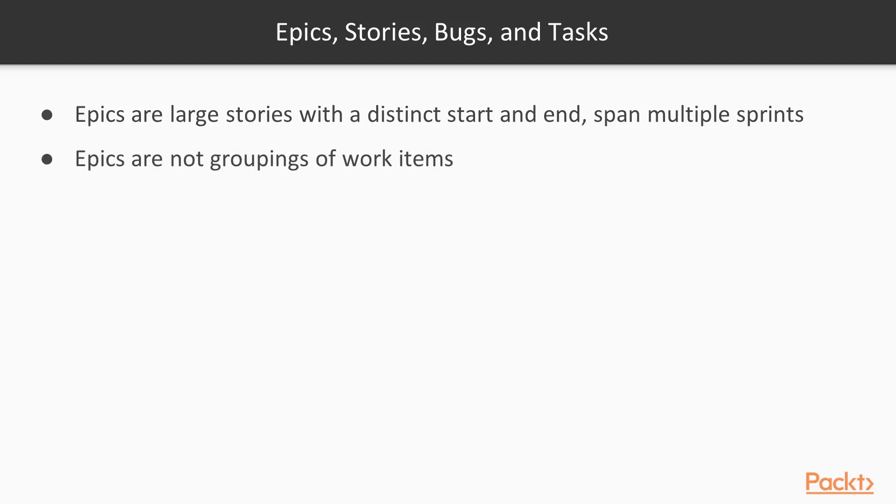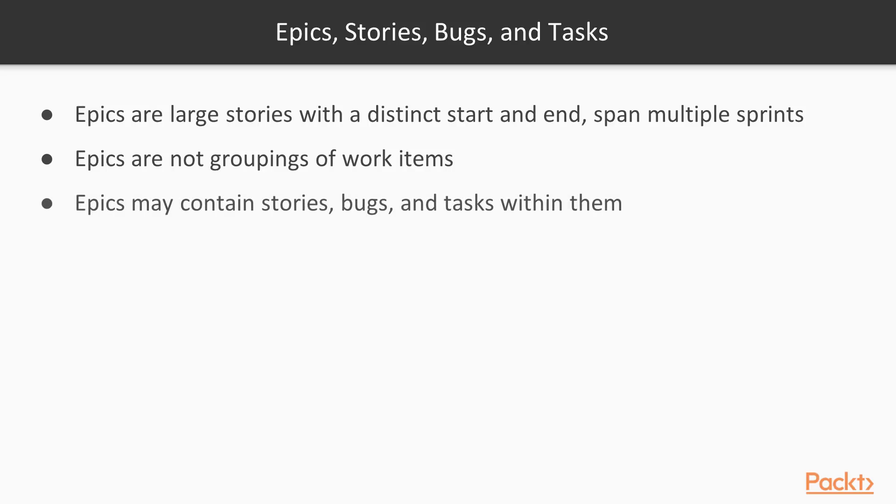Epics are not groupings of work items. And we'll take a look at that because that's a common thing that people do in Jira. So we'll take a look at how we use components and labels to do this instead of epics. Epics will contain stories, bugs, and tasks.